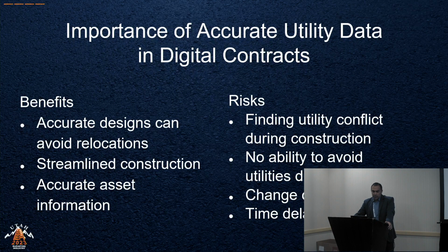I just listed out a few things that, with what Greg and Richard have been doing for utilities, there are a lot of advantages. Whenever we have a project where we don't know exactly where our utilities are, that's a risk. By being able to locate them using the information in the RULA system, we can accurately design around these utilities. Our goal is always to miss them first before relocating.